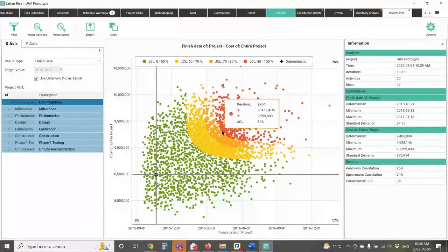on the model. Now, one of the things that's really useful when you're actually building the model is to do that step through so you can see, hey, what's this constraint doing to the model? These activities are all moving, but they're not stopping. Similarly, there's nothing to stop you putting a start finish relationship in, even though a lot of people consider it poor scheduling practice to use it. There's nothing to stop you doing it. The system will still work. You just may get results that you don't expect.